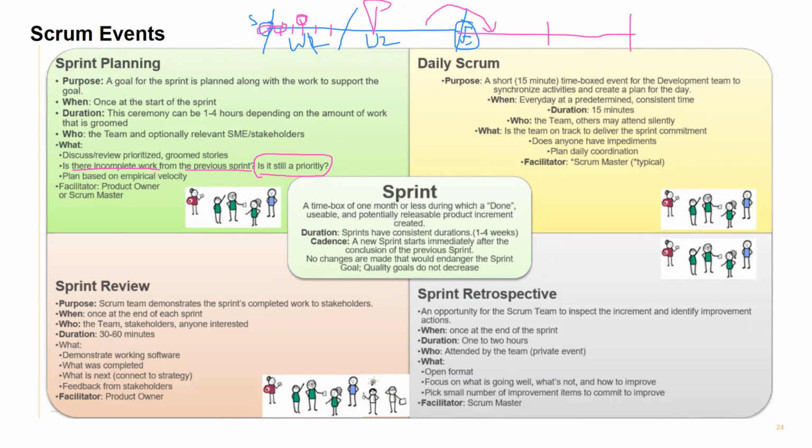So that is what you are going to discuss every day. You will revisit the planning. What can I do? How far am I with the sprint goal? Can I complete this? Every day you will see, okay, I have 5 work items that the entire team has to complete. I have completed 1, 2, but we are not able to complete the 3rd one. What should we do?